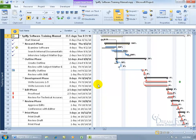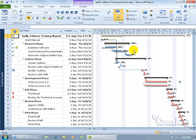Okay. As you recall in earlier training videos, anytime you see blue bars and red bars in a chart, you got the good guys versus the bad guys. The blue bars represent that the task can slip or be delayed before it affects the project's end date or pushes it out. How much? A couple of days, but if it goes out too far, eventually it's going to become critical, which is those task bars in red.